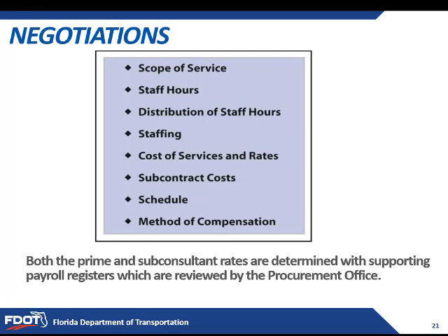Method of compensation. This includes lump sum and limited amount type methods. This can be used during negotiations if some of the items are uncertain until more project details are available. A typical contract is a lump sum contract.